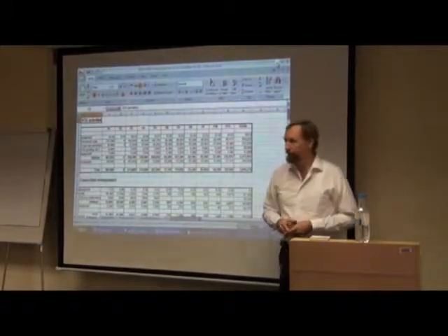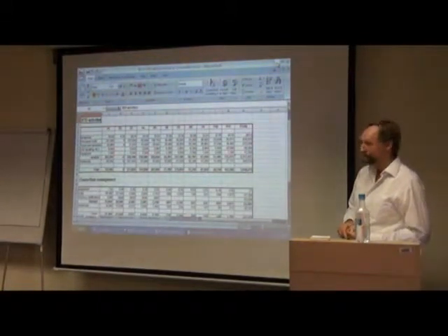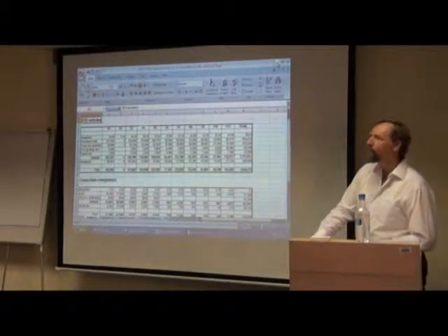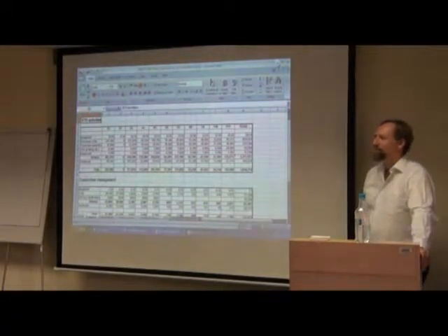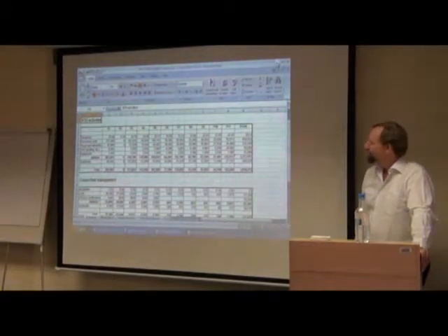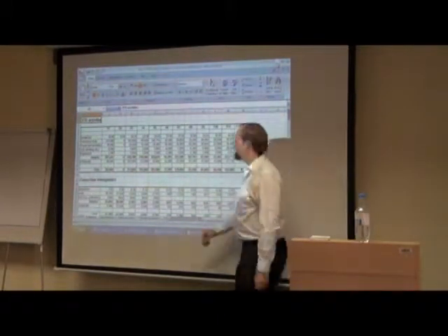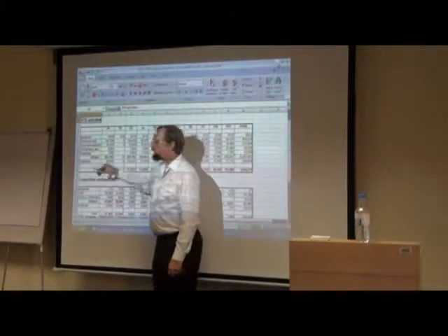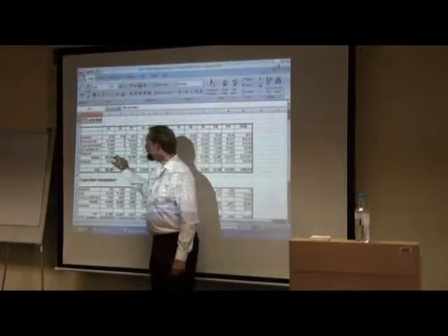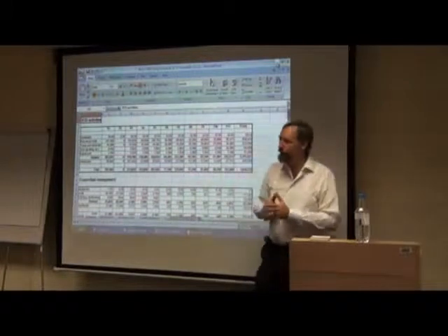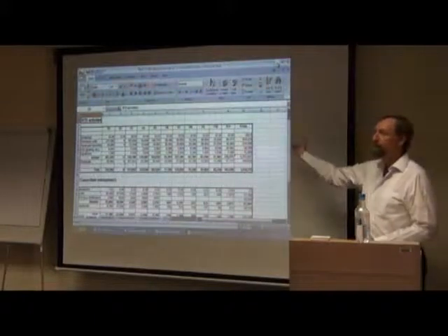This is good because, you see, in my other project, this summary seemed to be the rigid thing that I was supposed to input things into. Now, when it came to accounting, I had problems because there was no way in there where there was a workshop or training course. I see now you have it there, which is what I like. You can add additional lines, for subcontracting or for a special conference. You adapt it to the needs of your project. And of course, if you have fewer partners, you eliminate a number of columns.